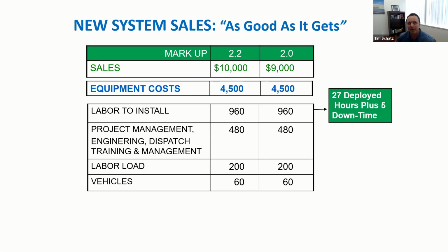We'll get into this when we talk more about hourly labor efficiency: we know, come hell or high water, we're lucky if we get 75% uptime overall. So whenever I build a labor profile, we're always going to add a few more hours. We'll get into that later, but it's just to let you know how we came up with that. The other folks in operations, project manager, operations manager, dispatcher, those kinds of employees, typically run about 50% on average over the course of an entire year, about half of the cost of whatever our payroll is for the technician side.